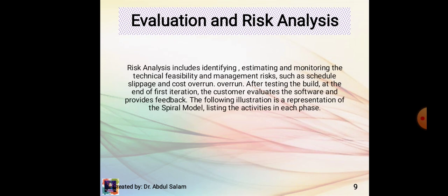Evaluation and risk analysis. Risk analysis includes identifying, estimating, and monitoring the technical feasibility and management risks, such as schedule slippage and cost overrun. After testing the build, at the end of the first iteration, the customer evaluates the software and provides feedback. The following illustration is a representation of the spiral model, listing the activities in each phase.